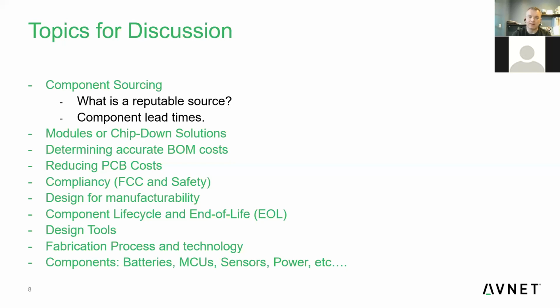A lot of the times with Hardware Studio Connection participants, or when we're evaluating people to come into the program, we spend a lot of time talking about schedules. And one of the things that we're kind of sensitive to is when schedules are extremely aggressive and they tend to ignore details like lead times, right?